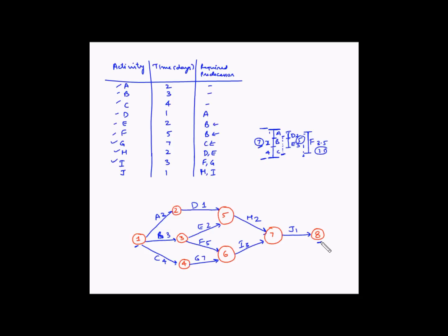While tracing a path from the first to the last node, one should always move along the direction of the arrows. In this case, since our arrows move from left to right, we determine the critical path by moving left to right. The duration of the critical path is simply the sum of the durations of all activities in that path.